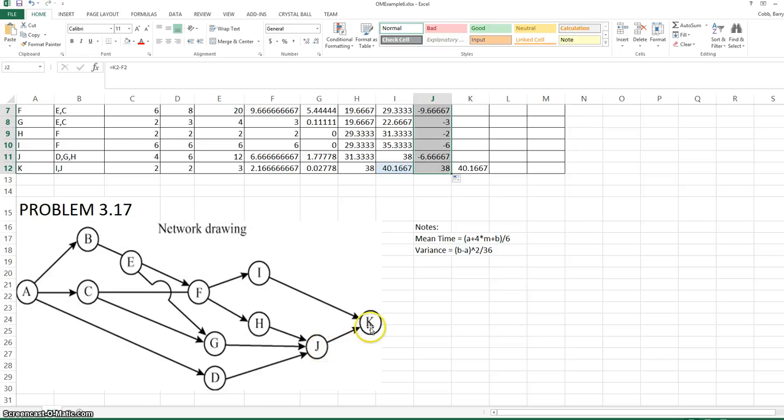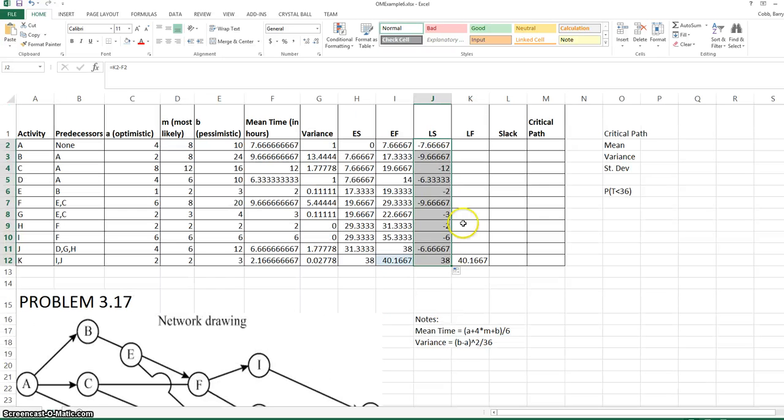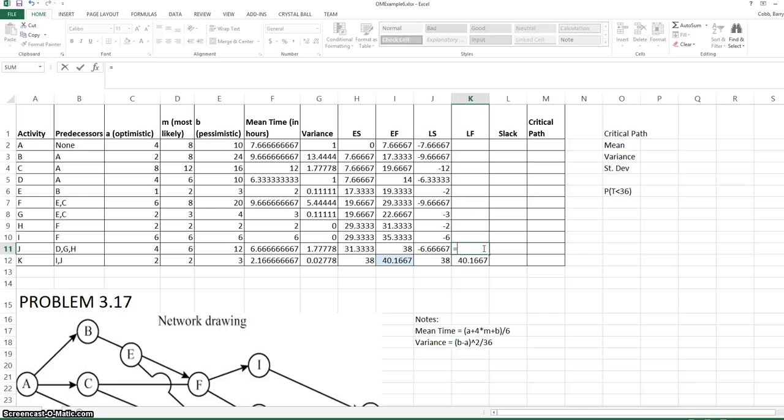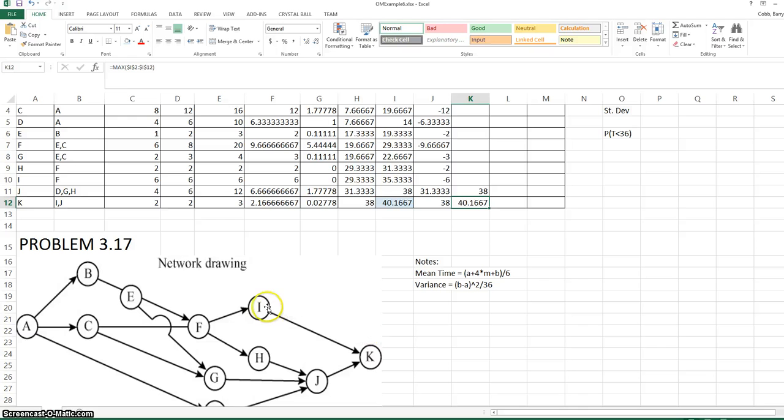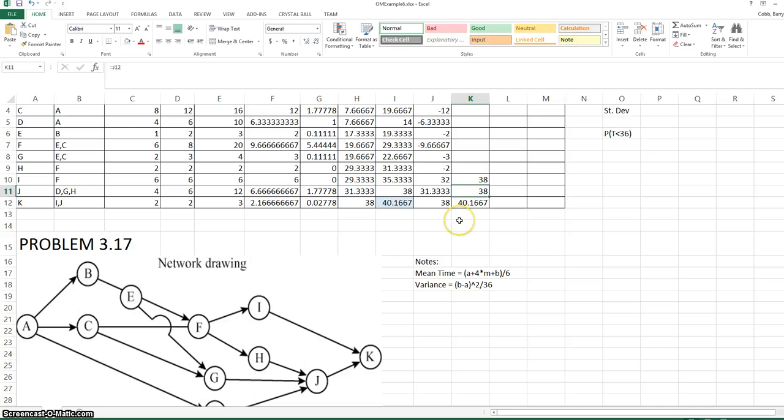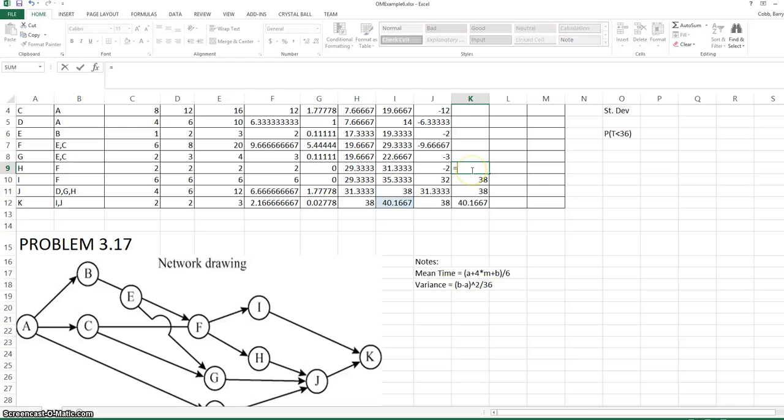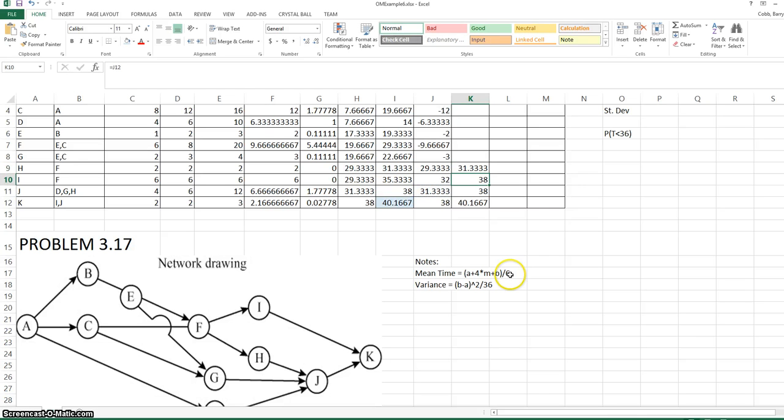J has one successor in the network, that's K. So the late finish for J is equal to the late start for K. I works the same way. H has one successor, that's J. So the latest finish is equal to the late start for J. G works the same way.